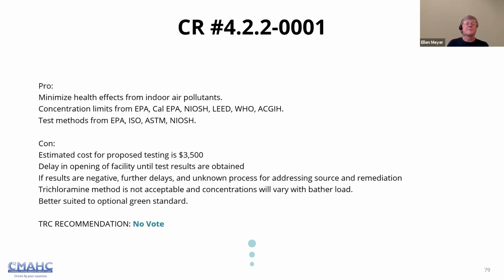And so a lot of people, when they build a facility, they want to get open as quickly as possible so they can start getting revenue coming in. And this would be a delay in that process because everything would have to be in place before you can even do the testing. It needs to be a fully functional facility so that you can get a proper reading. So everything has to be done first, and then you do your testing, then you wait for your results.